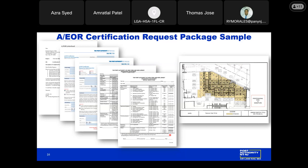It's cumulative, so the most recent date overrides the prior date, if applicable. And we want to just make sure that the dates in these specific categories are happening on or before the partial inspection date signed by the engineer of record. So if I see a cold form steel construction dated 4-4, and maybe this form was used at a prior inspection when the partial inspection was 4-4, and now we have an elevator escalator inspection report that's dated 7-3, obviously I could not accept that special inspections checklist because the dates are not in alignment.